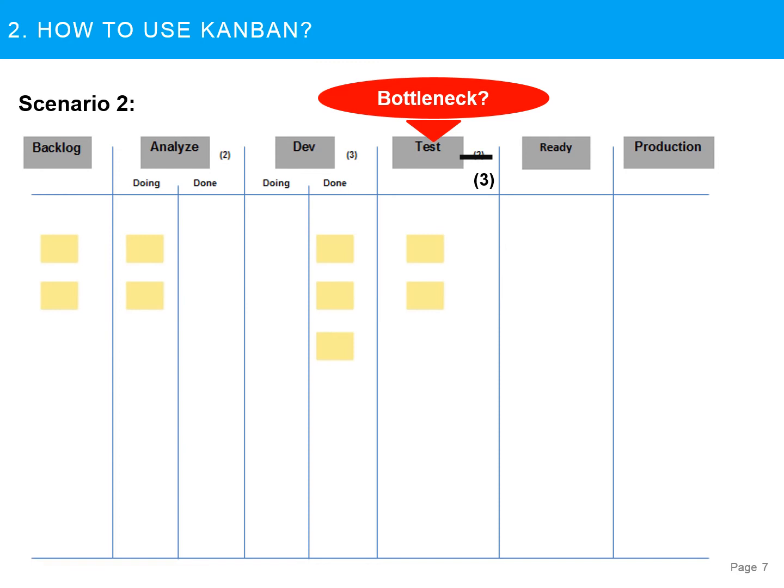So if any of you is familiar with the theory of constraints, this is termed as elevating the bottleneck. But first we should exploit or subordinate the bottleneck.